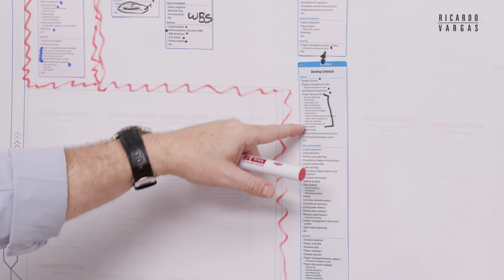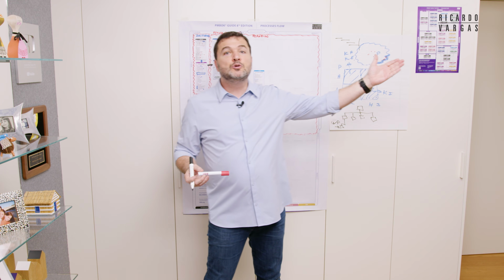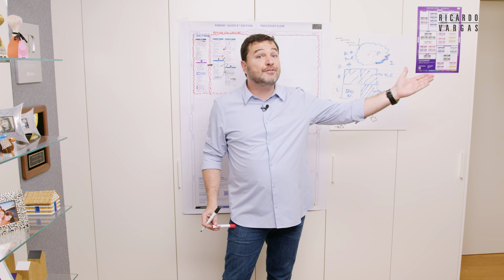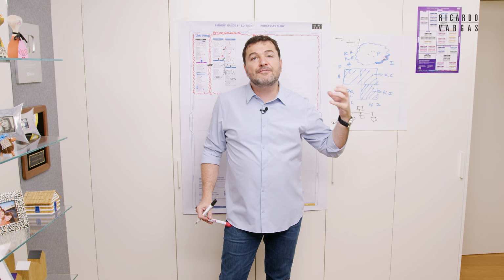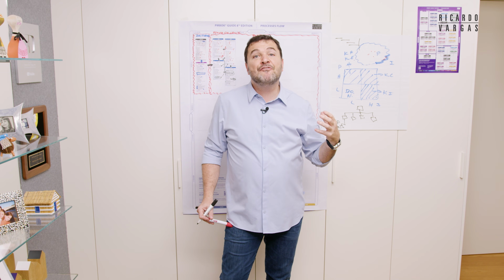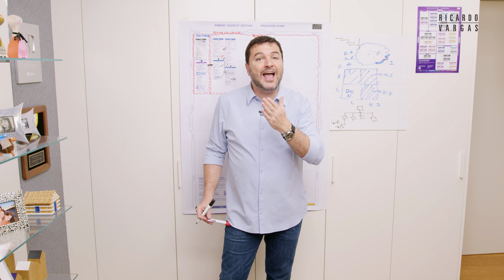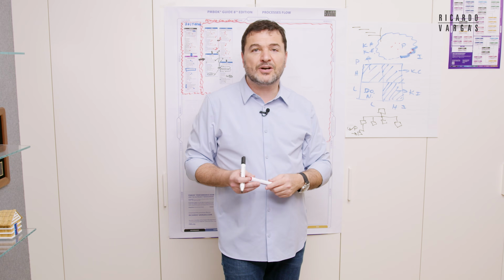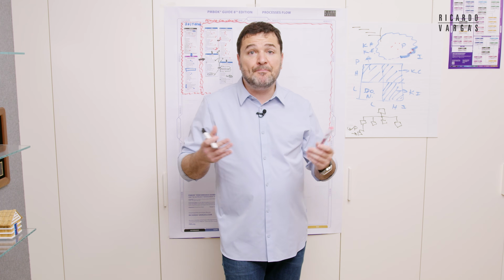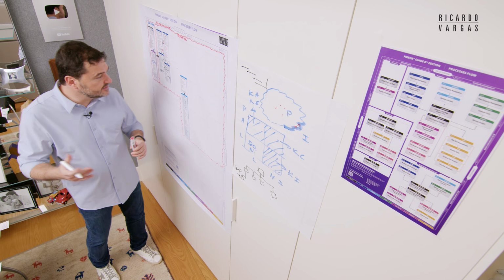Resource requirements. For example, if you have 10 people to paint this wall, it's different than if you have one, right? Because most of the tasks are considered effort-driven. It means that you add resources, you reduce the duration. It means that the relationship between the duration and the number of resources is very relevant. Of course, it's not for all projects. I cannot say that, for example, 9 women will produce a baby in a month. Okay, so this is very important.